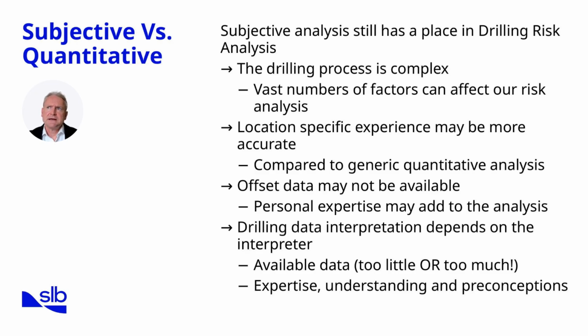However, the drilling process is highly complex, with countless interacting variables. This complexity means that subjective assessments can miss key hazards or be overly influenced by preconceptions. Quantitative analysis, on the other hand, uses structured tools to measure likelihood and severity. These tools provide consistency, documentation, and repeatability. They also enable risk to be communicated clearly across disciplines. However, quantitative analysis is limited by the quality of available data. Too little information may make the model simplistic, while too much data may overwhelm the process and introduce new biases.